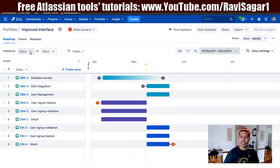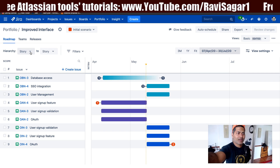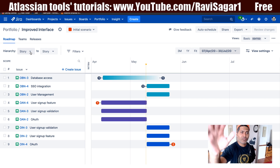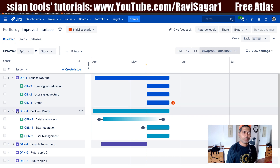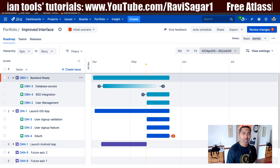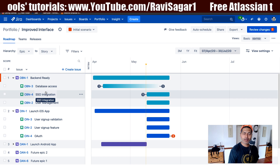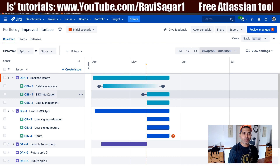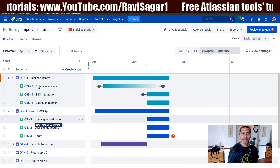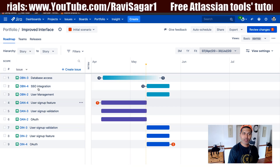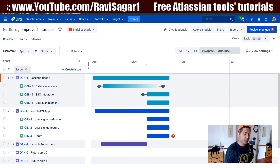You can change the order of the issues, but the change will basically be applicable only at the level you're working on. So if I change it back to epic and move my 'Backend Ready' above my 'Launch iOS App', now you can probably see that we have the order you were expecting for stories: database access, followed by SSO integration, user management, user signup, and so on. If I switch it to story again, we have the same order. This is how Portfolio will work if you are working on the improved interface.